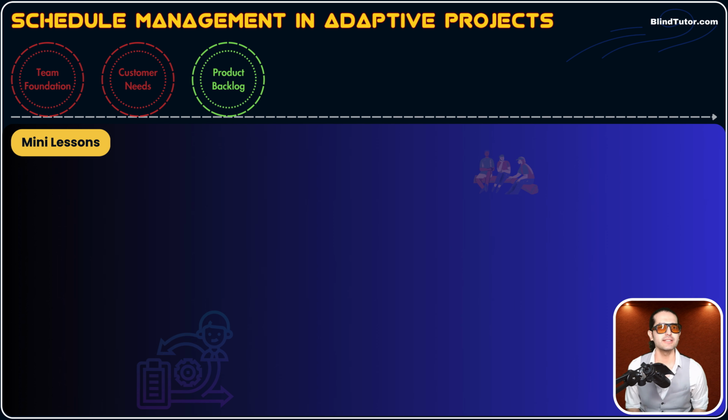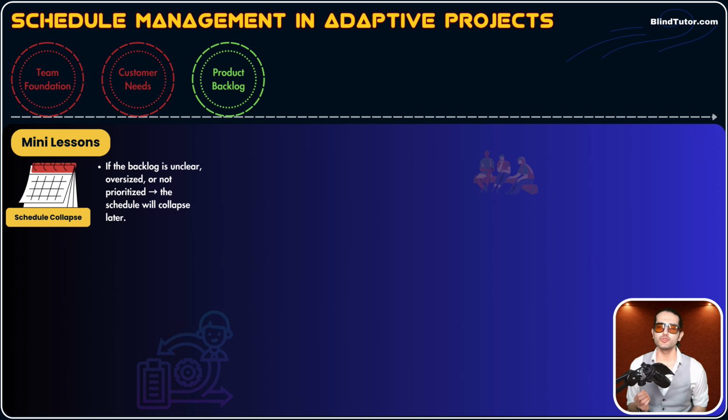Okay, the first concept is we need to try to prevent schedule collapse. You may be wondering, what is a schedule collapse? Guys, we did the math, 1,000 divided by 20, and we give a high-level schedule. The very important thing is we assumed our team could do 20 story points per sprint, and the total story points of our project is 1,000.